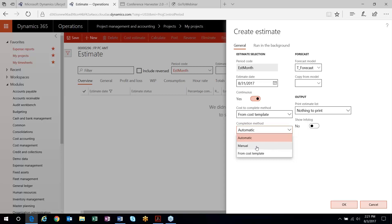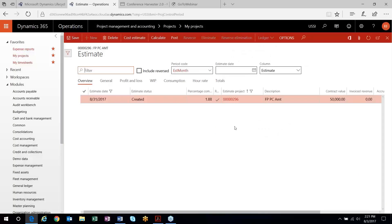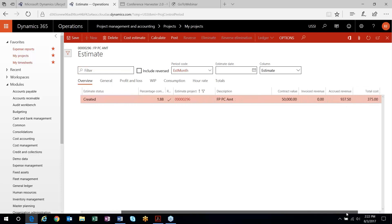You can manually record the percent complete that you want on your project, but I'll keep it as automatic for now. I'm going to use the total forecast model I had created. It came in at 1.88% complete after I calculated it — it picked up that $50,000 for my contract value, calculated 1.88% complete, and it's going to accrue that much revenue on my project.